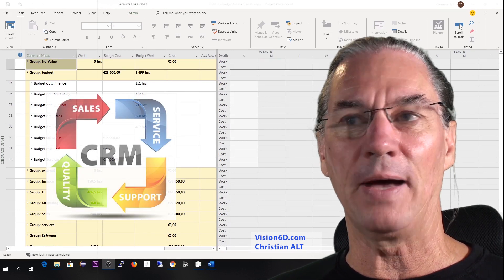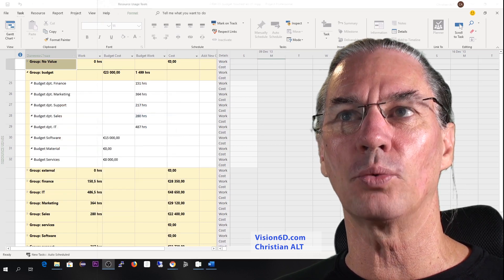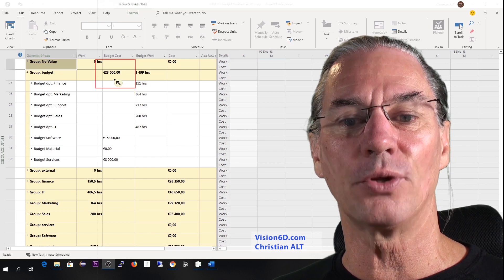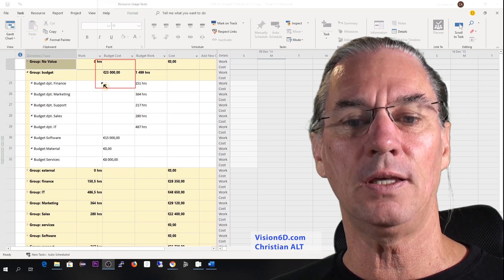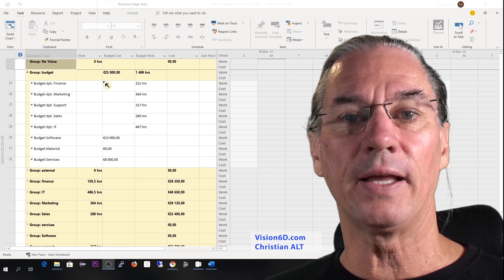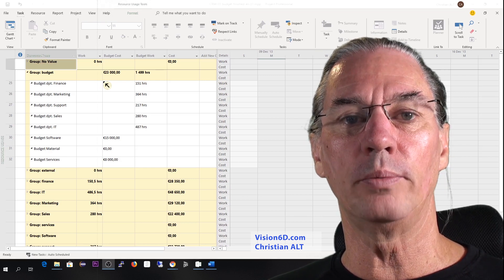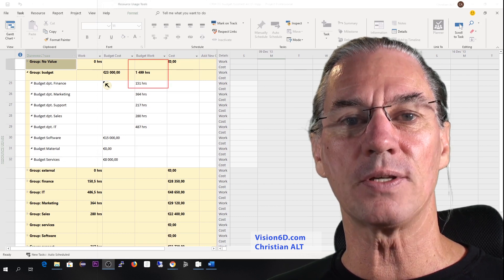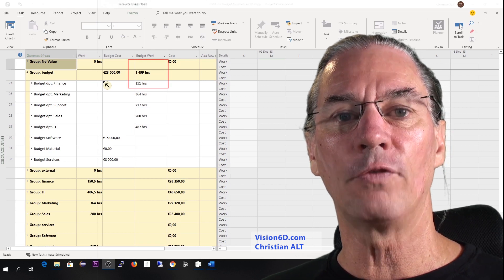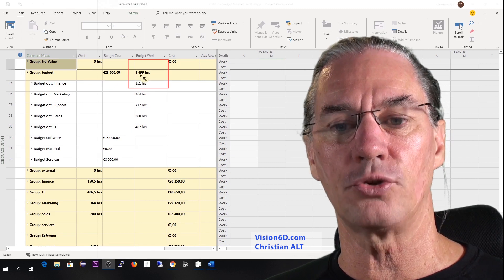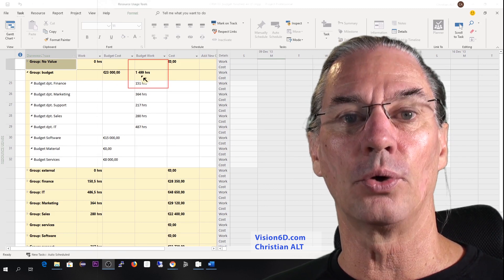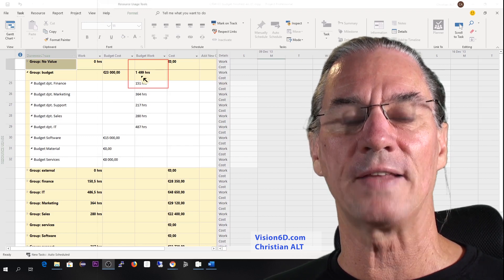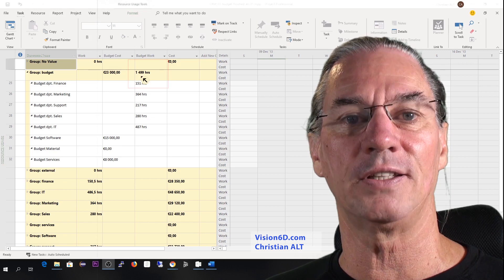We have a budget which is composed of one part, which is investment. That investment part is those 23,000 that you see here. Besides that, internal people will be involved in the company to work on the project. For that, there is also a budget of working hours involved in the project — those 1,500 hours, which MS Project shows as 1,499 hours.